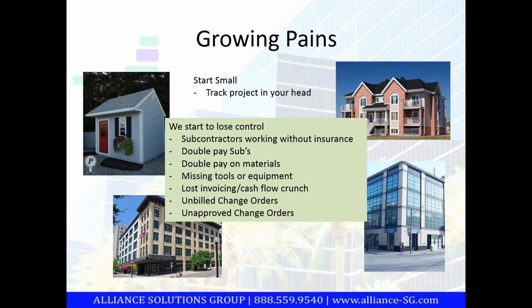And then on the cash flow side, maybe I forget to invoice somebody. Maybe there are unapproved change orders that I've started to work on. Now I'm going to have difficulty invoicing those change orders. Or I just forget the change order altogether and forget to bill it. These things happen because as I grow the business, I'm not in control because I can't keep it all in my head anymore. I may be relying on new foremen or superintendents that aren't as advanced or sophisticated or been in the business as long as me, and so I can't expect them to have the same knowledge that I have. So it's very typical that we start off with it all in our head, we move to QuickBooks, we still have control, then we start expanding the business and mistakes occur.